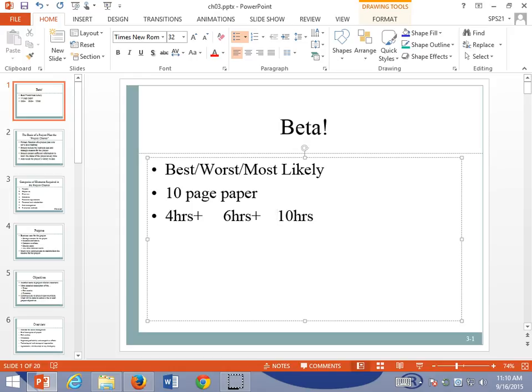And so we're really doing nothing more than a weighted average. We're going to take all of these values, and I'm going to take this one in the middle, our most likely, and I'm going to take it times 4.